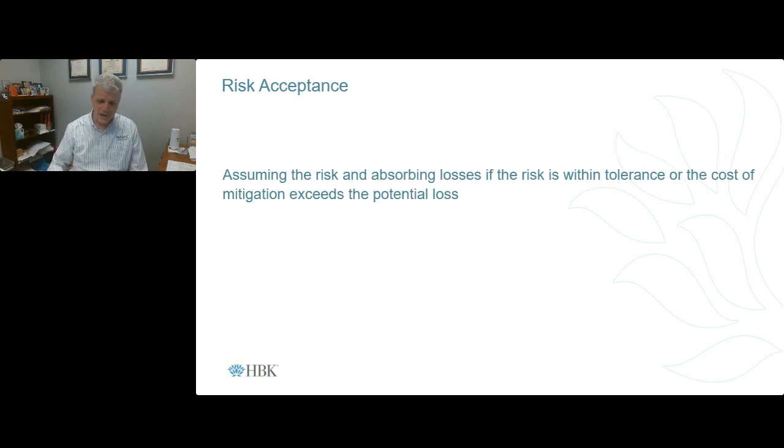And then the last option that you get is basically just you're going to accept the risk. That is basically you're assuming the risk and absorbing the losses if the risk is within tolerance or the cost of mitigation exceeds the potential loss.